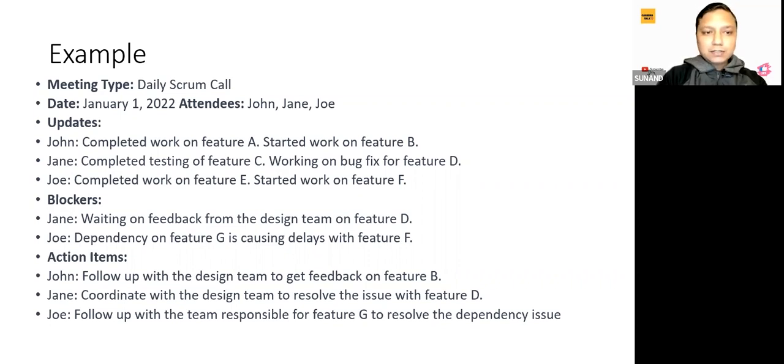If you feel that today some major blockers have been identified, you can take those important daily Scrum points, jot down minutes, and distribute them, because sometimes there are blockers which need attention from stakeholders, from the client, from higher management. In those cases, you can use this kind of format and template, and send it across to the different stakeholders, right?